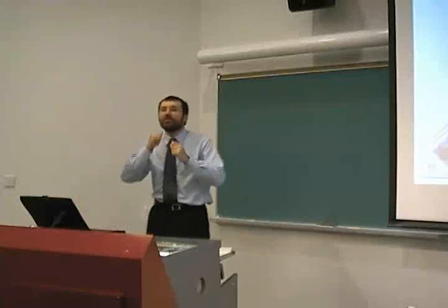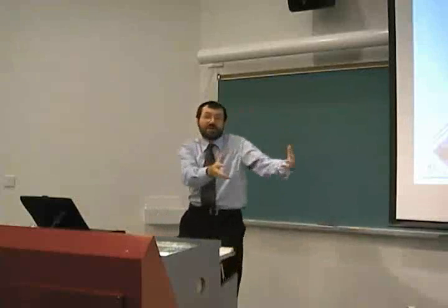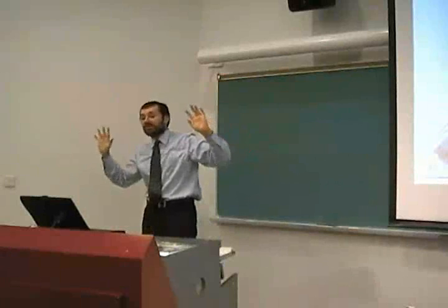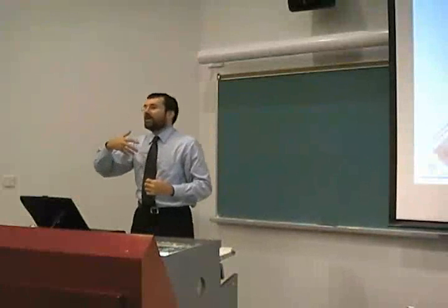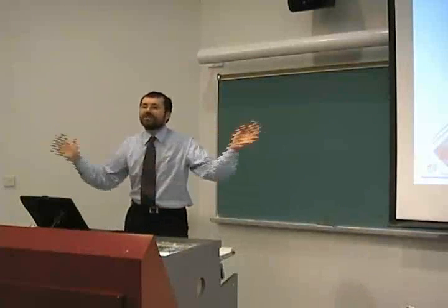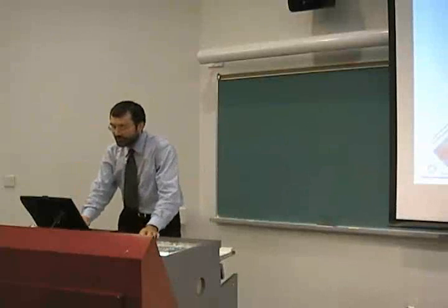Because then, if you start having problems after 3-4 months, you haven't got them anything. The first approach had something after 2 months. Now you've got problems after 3 or 4 months with the big bang approach. They've got nothing. The system drags on, new requirements get added, and then you decide you're going to have to start all over again because your whole architecture is wrong. They've got nothing. Systems fail. So do things in small increments. Avoid these billion-dollar catastrophes or $1,000 catastrophes of total failures of systems.